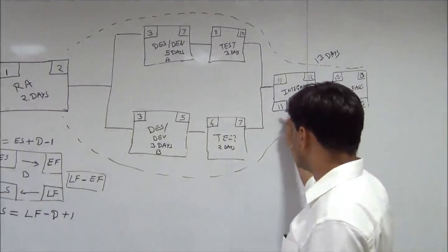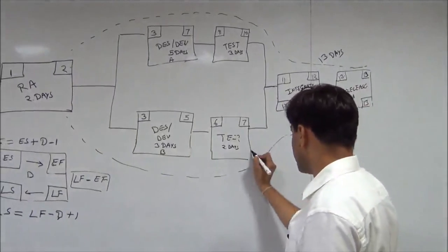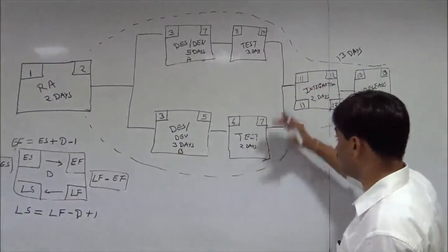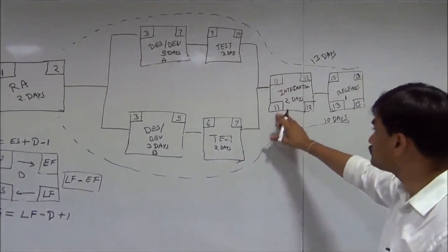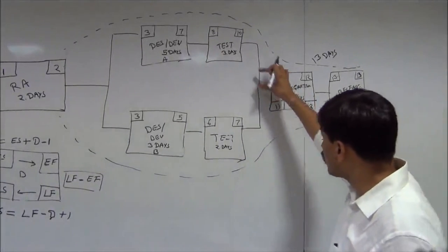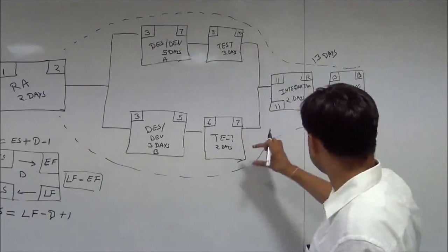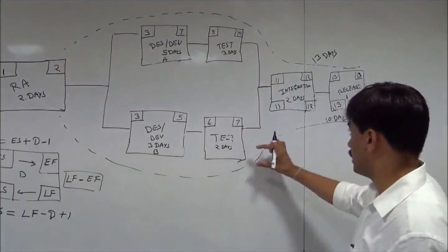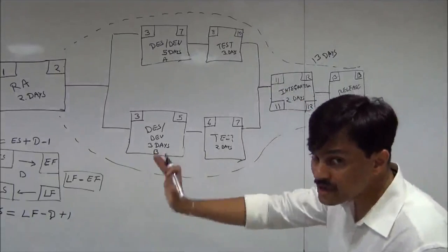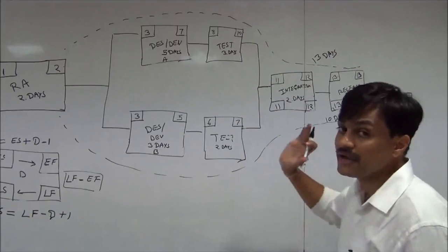So let's look backward, and here we have a confusion again. We have two activities and we have 11 as a number. Now this 11 goes here as well as here. Now 11 minus 1, since we are going backward, we need to do a minus 1.